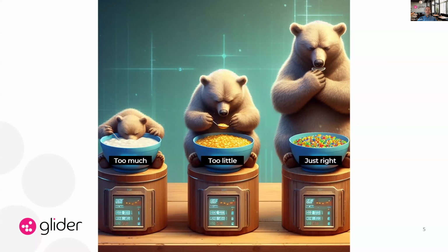So we make provisions. You would look at what could be too much data, what would be too little data, and then what is the right amount of data. And this is very important, but we can't predict the future. We have an idea of what might be useful, but we don't want to overburden the supply chain to deliver over and above what is useful, as that would be very disruptive and in turn quite expensive. And we don't want to underdeliver, because that will create a lot of work for the operator to resurvey the building, which does happen quite a lot.